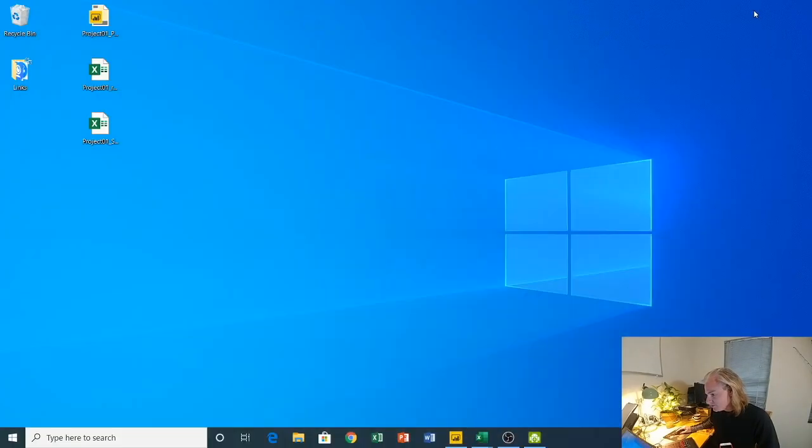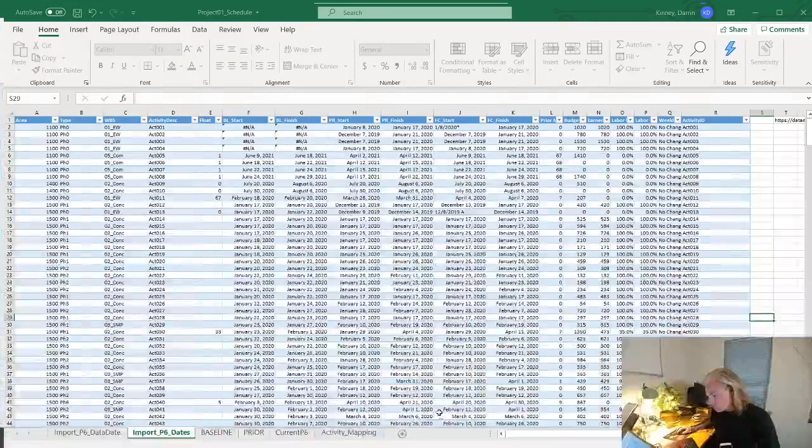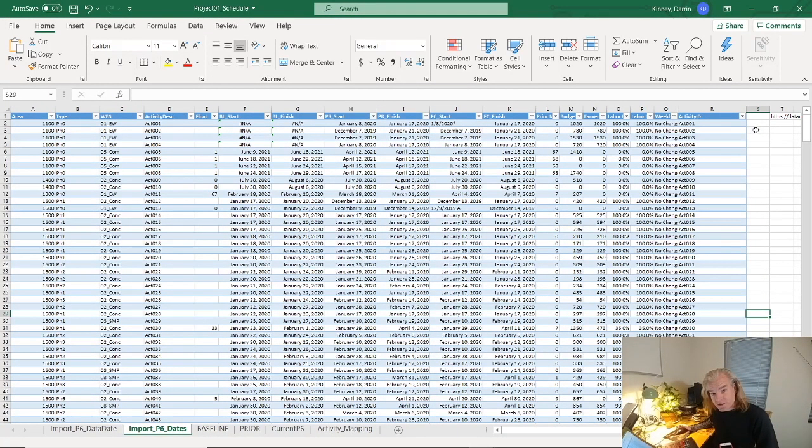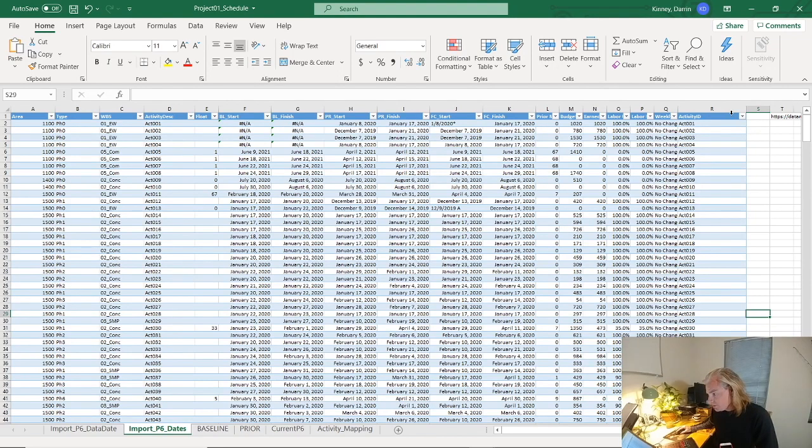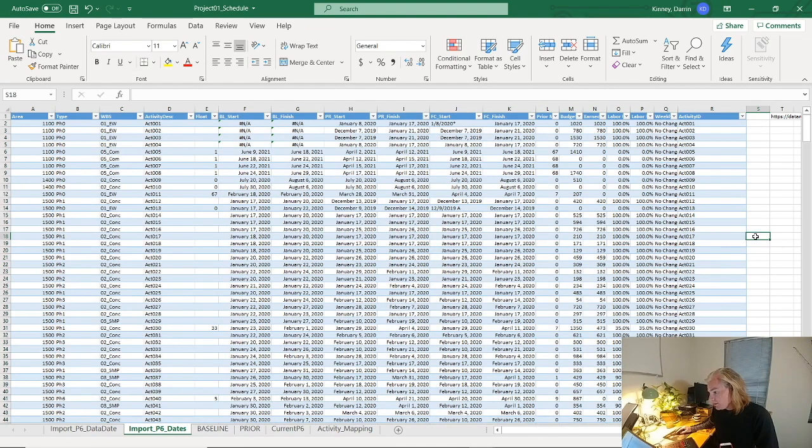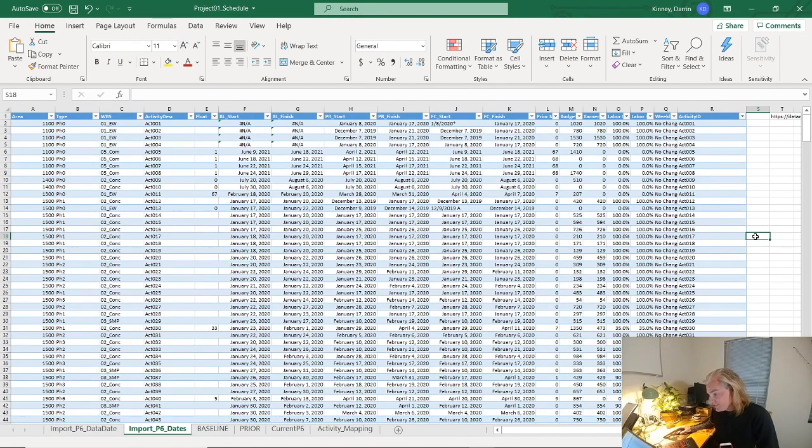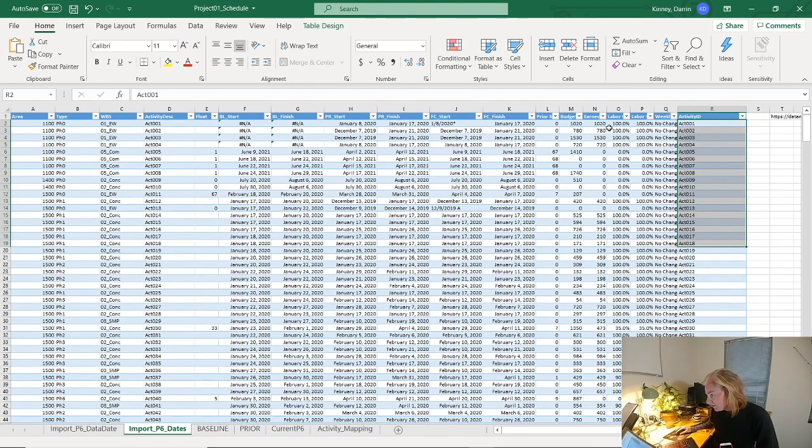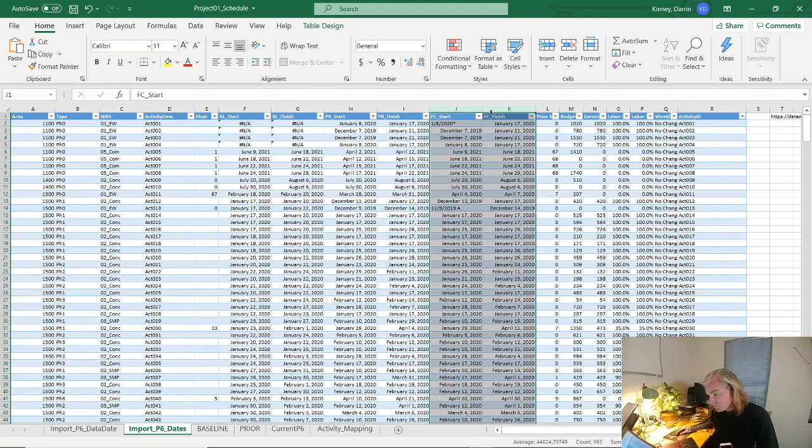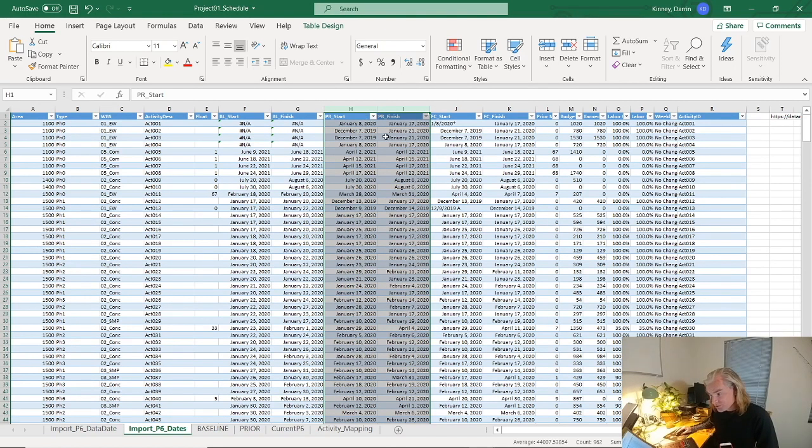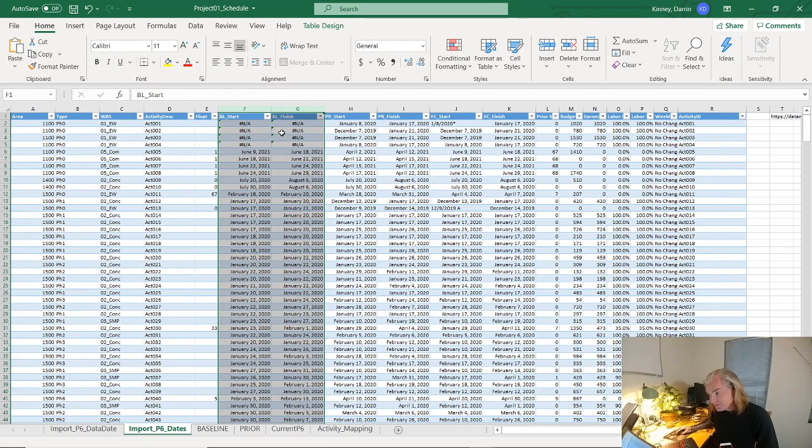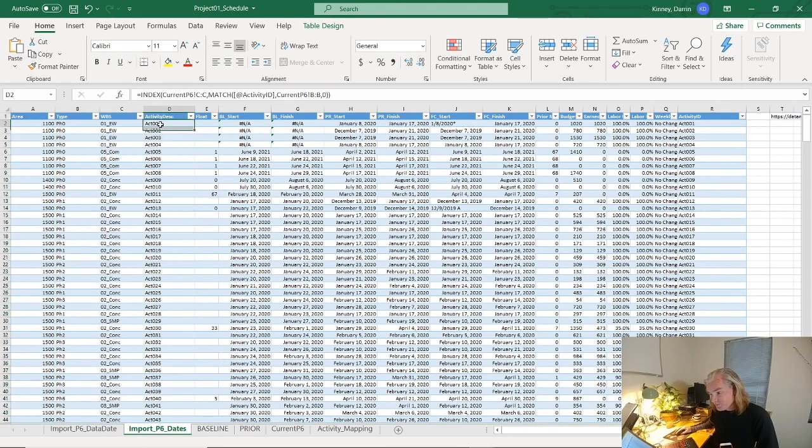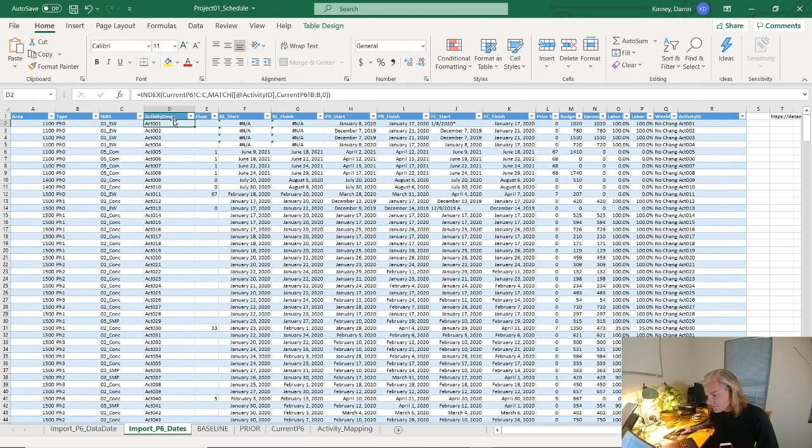Let's dive right into it. As you can see, I have two Excel files. This is my schedule import file that goes into my dashboard. You'll notice that this is just a flat Excel file - I'm not using an XER, I'm not using any transformation of data. I just have a list of schedule activities with resource information, current forecast finish dates, last week, last month or whatever your prior update is, start to finish date and whatever your baseline is, start to finish date, level one, two, three WBS structure, and your activity description - pretty standard information.